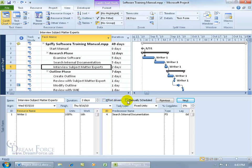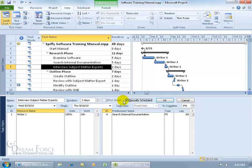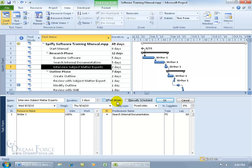Let me go ahead and show you manually. You don't get effort driven or the task type. Undo it, you get effort driven. What is effort driven? It's where the more work resources that are assigned to a task, the less time or effort it takes to complete it and hence it will reduce the time fields.